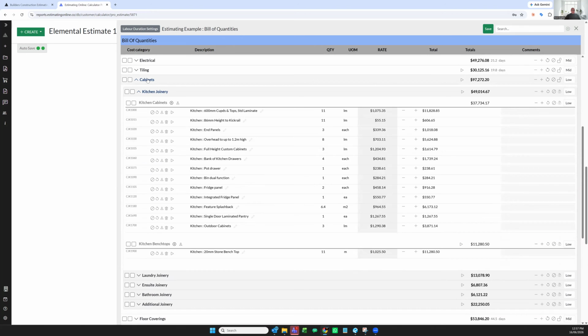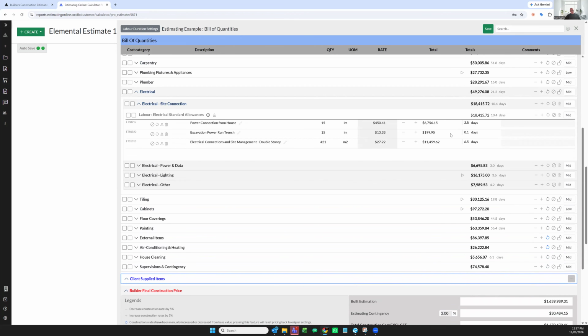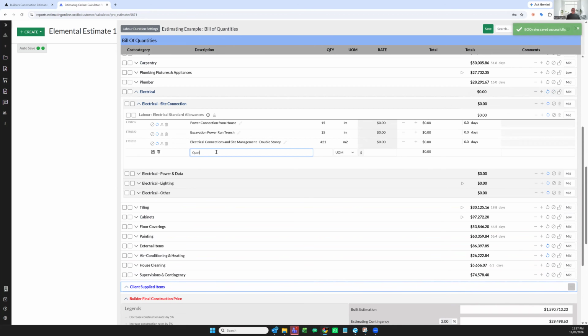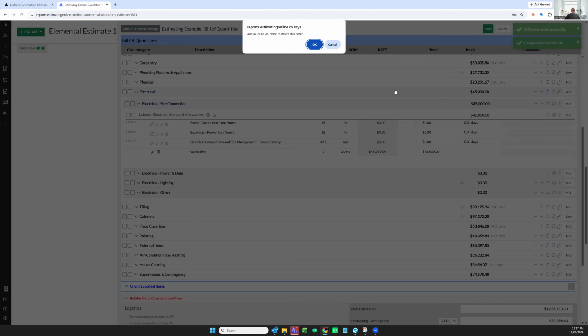If you have a quotation for, let's say, electrical, there is a simple process. You click the 0 button, reset to 0, price goes back to 0, add an item, quotation, $45,000, save. We've just added $45,000 into the estimate.